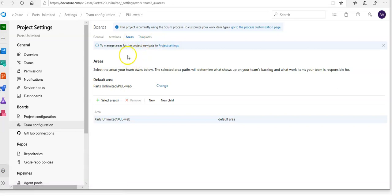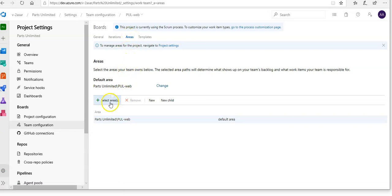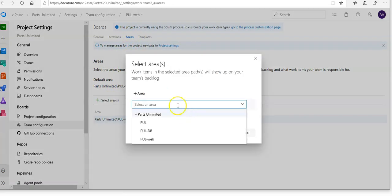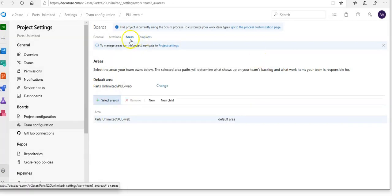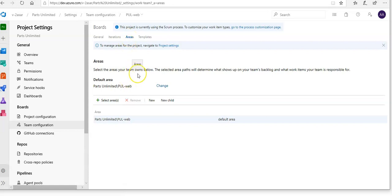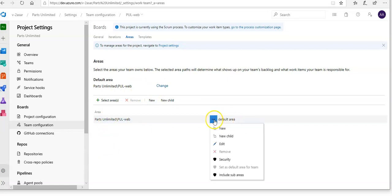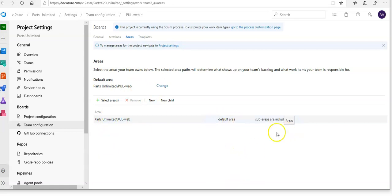Now if you go to the Areas tab and select areas, you can include sub-areas. The default setting for all teams is to exclude the sub-area paths. We will change it to include sub-areas so that the team gets visibility into all of the work items for all the teams. Optionally, the management team could also choose not to include sub-areas, thereby removing work items from their view as soon as they are assigned to other teams.